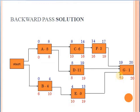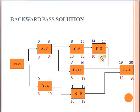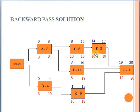If 19 is the latest start of G, then the predecessors F, D, and E can finish their activity — and they have till week 19. So 19 is their latest possible finish, and I move this number 19 to each of them. Because even if I finish early, I have maximum till week 19 to deliver the completion of these activities. So 19 is the latest finish of F. The latest start of F is 19 minus 3, which is 16.